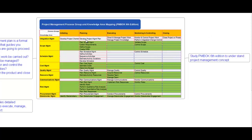Under monitoring and controlling process group: integration management covers monitor and control project work and perform integrated change control. Scope management covers validate scope and control scope. Schedule management covers control schedule. Cost management covers control cost. Quality management covers control quality. Resource management covers control resources. Communication management covers monitor communications. Risk management covers monitor risks. Procurement management covers control procurement. Stakeholder management covers monitor stakeholder engagement. Under the closing process group, integration management covers close project or phase.